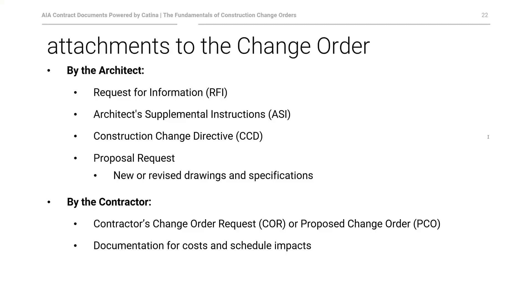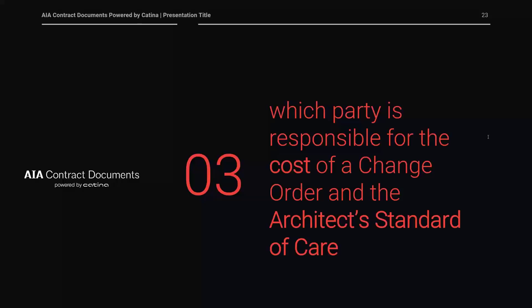To finalize, compile all attachments and issue with the change order. It's common to print in triplicate — one original for each signatory. The architect typically signs first, followed by the contractor, then by the owner. Alternatively, if the parties agree, all can be handled electronically in PDF form and signed electronically. We'll now turn to how responsibility for the change amongst the parties may be determined.